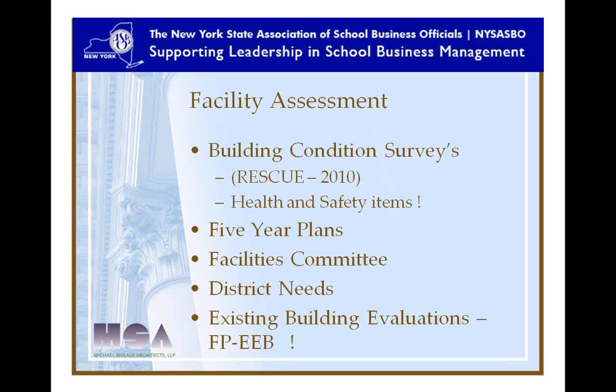And there's over 50 items that we have to look at and certify whether it's compliant or non-compliant. And these items are different than what's on the RESCUE and the building condition surveys, and oftentimes they add costs to a project because those nonconformances have to be corrected as part of any work in a particular building.